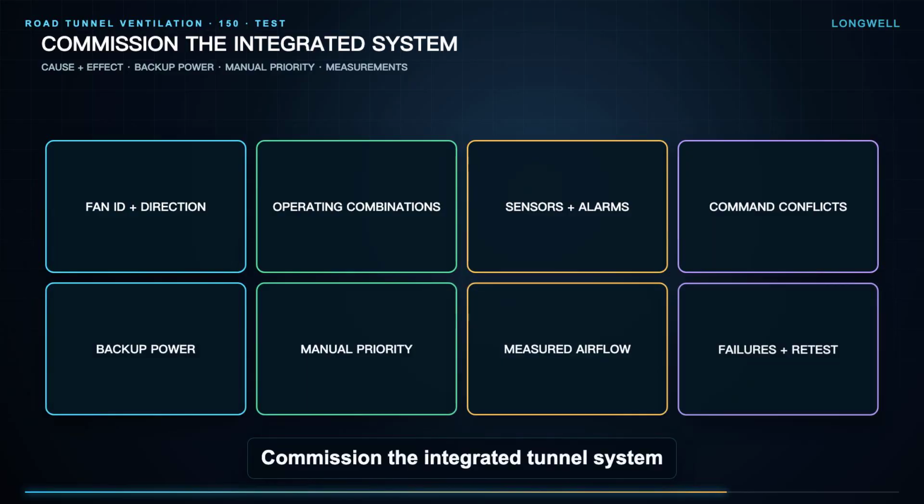Commission the integrated tunnel system under an approved procedure. Verify fan identity and direction, operating combinations, sensor and alarm logic, contradictory command prevention, emergency power, manual priorities, communications, measured airflow, documented failures, maintenance access, and periodic retest needs.